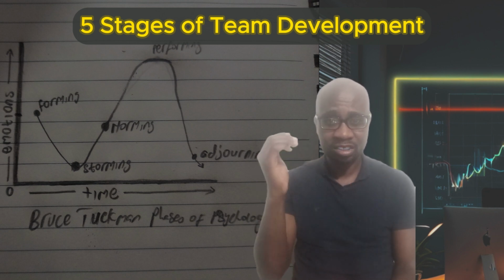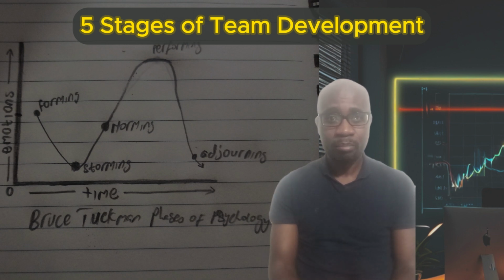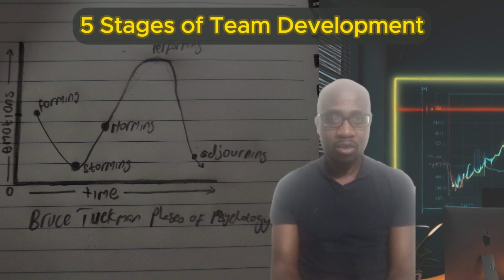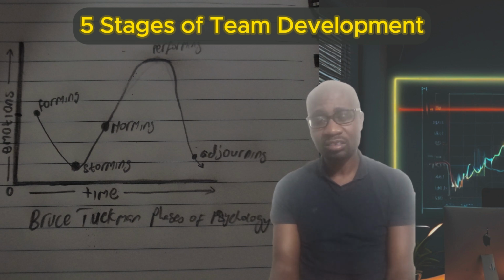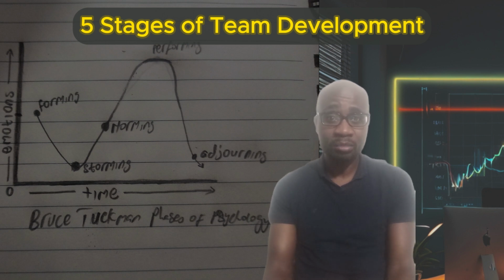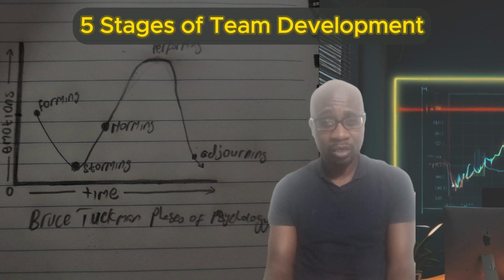You didn't understand each other's mind, the way somebody thinks and how they address their thinking. Now, what did you learn? Then they can walk you through all the steps to say, in this part, we learned this. In risk, the planning of the risk itself and the mitigations were there, but well, this project actually took us by surprise, whereby we didn't actually implement a lot of the mitigations as it was zoned out on the paper.